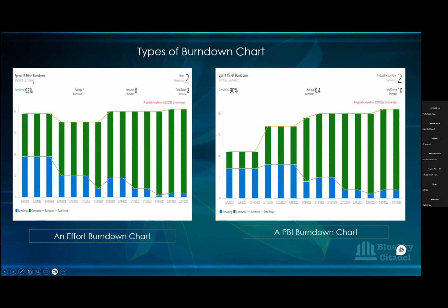It's giving you the period, and the completed percentage, 95% complete. Looking at the end of that sprint, it's projecting that they still need 2 more days to complete what was remaining. The two story points remaining, it's telling them it's going to take 2 more days to complete. And why it's saying that is because it's looked at the pace at which work was done.